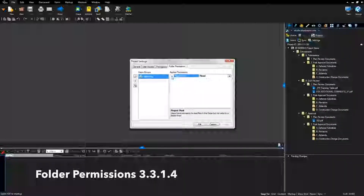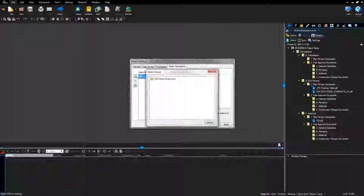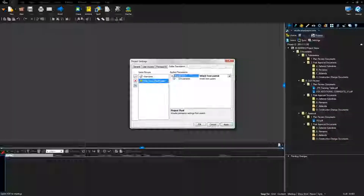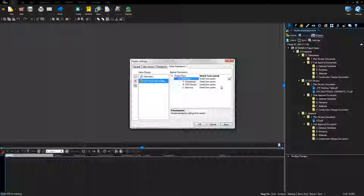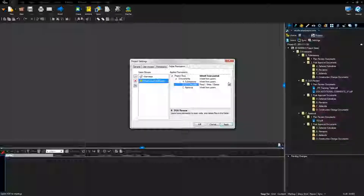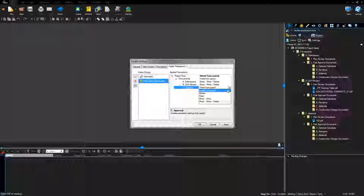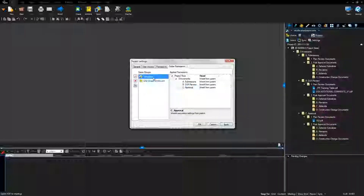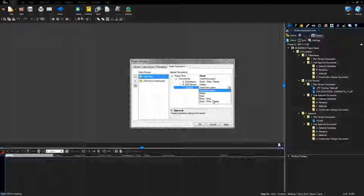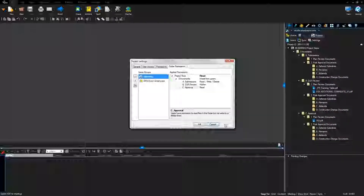Click the Folder Permissions tab. Select the green plus button and add DSA Direct Employees. Expand the Bluebeam Project folder structure. Update the DSA Review folder to Read, Write, and Delete for DSA Direct Employees. Submissions: Read, Write, and Delete. Approval: Read. Attendees: update the permission level for submission to Read, Write, and Delete. DSA Review: Hidden. Approval: Read. Click Apply. Click OK to close the Settings window.